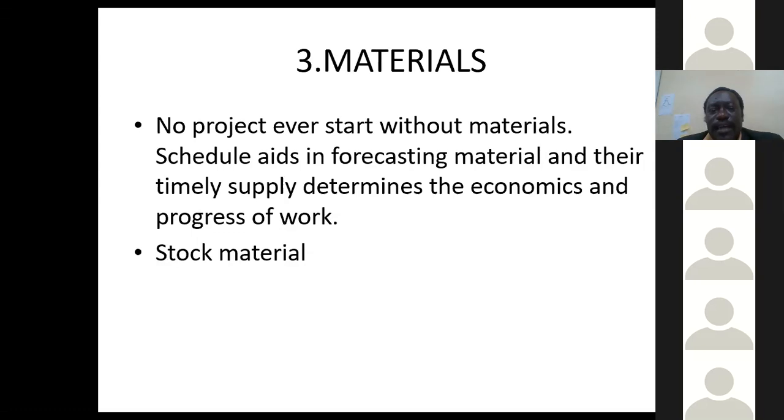Material, sometimes materials are not coming in time. No project ever starts without material. You should know that the schedule aids in forecasting material, and their timely supply determines the economics and progress of work. So you also need to consider the stock of material. How are you going to stock all those kinds of things? It's very important.